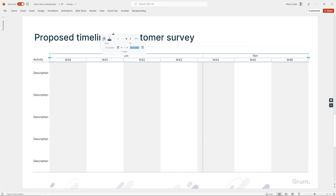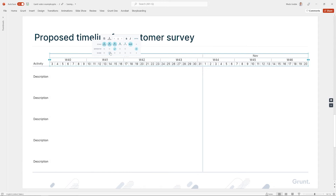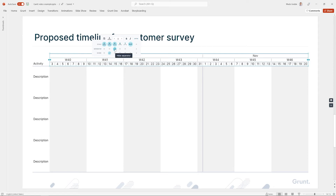Step two is to decide what my timeline will include. This menu lets me choose which date parts to include. In my case I want to show both months, weeks, and days. Step three is to choose how my timeline will look. Expanding the advanced section allows me to toggle shading for the different periods on or off, or display separator lines between the periods. In my case I want shading on my weeks and separators between months and days.